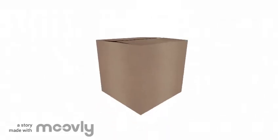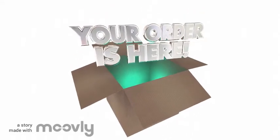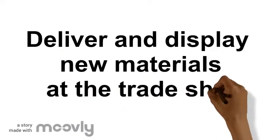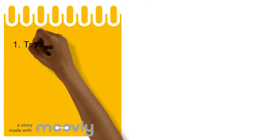Sophie and Jason identify that one of the requirements is to deliver and display the new materials at the trade shows. After some consideration and discussion with the project sponsor and other stakeholders, they decide that the project team will not perform this requirement, but instead, the marketing department trade show team will be given the necessary materials before the events. From this discussion, Sophie decides that there are 3 main categories of work for the project and writes the following on a notepad. 1.